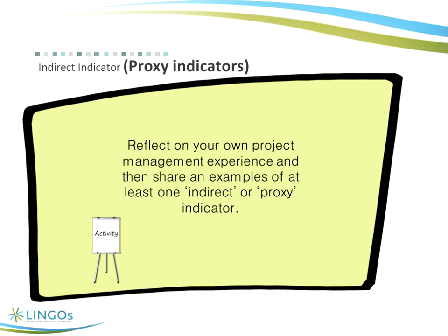So one person has said that there's a proxy measurement, an indirect way of measuring this kind of stress: you can monitor the number of cattle that are coming into markets, in a larger village or a town that would have a market.